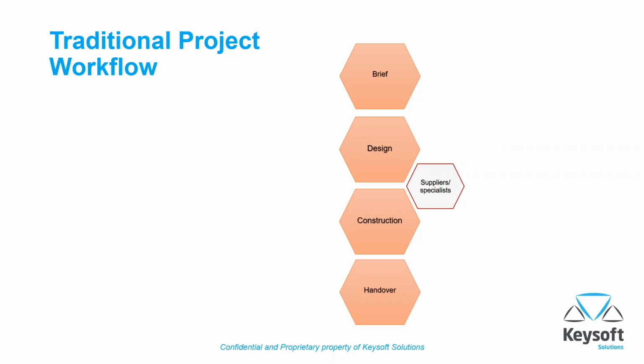And you may have even put together a document or a binder that has how to do a project at my firm. And you can hand this off to a new designer or project manager, and this kind of guides them through your way of doing things. The difference between the traditional project and the BIM project is that this level of organization is extended across the entire design team, all the consultants, anyone that might contribute, including suppliers and vendors. And it also applies to the entire project timeline, not just the design phase. So from entitlements and proposal phase work all the way through construction, project handover, and project maintenance even.